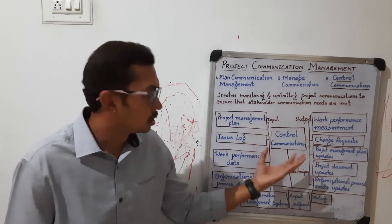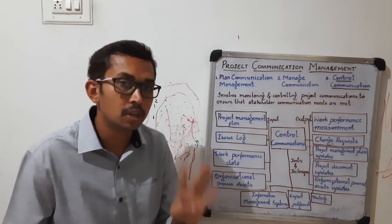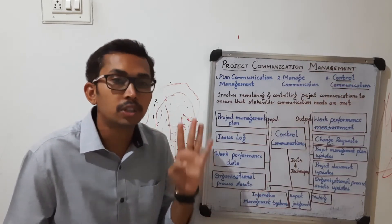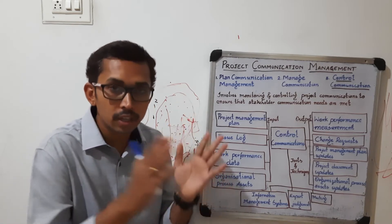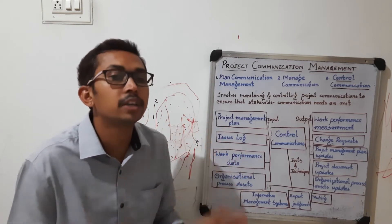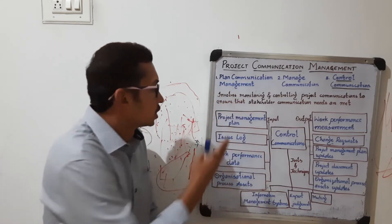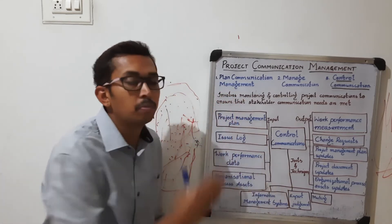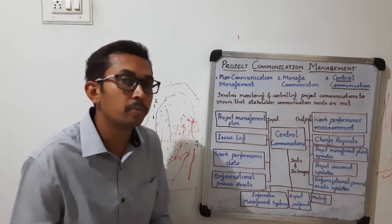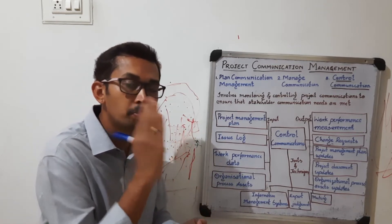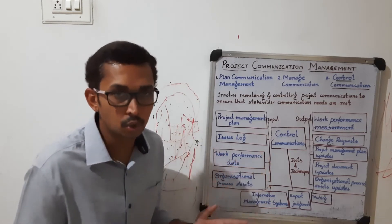Control communication comes into the picture in project lifecycle phase number 4 — the controlling and monitoring phase. The first input is the project management plan, which is a formal document that tells how to perform, execute, and control the project.